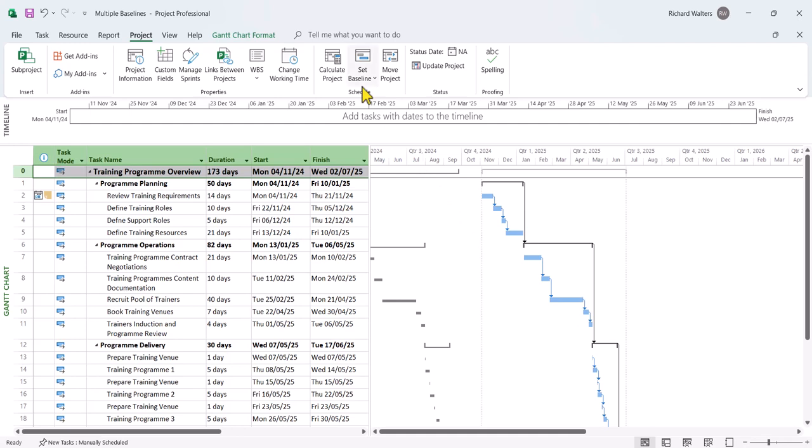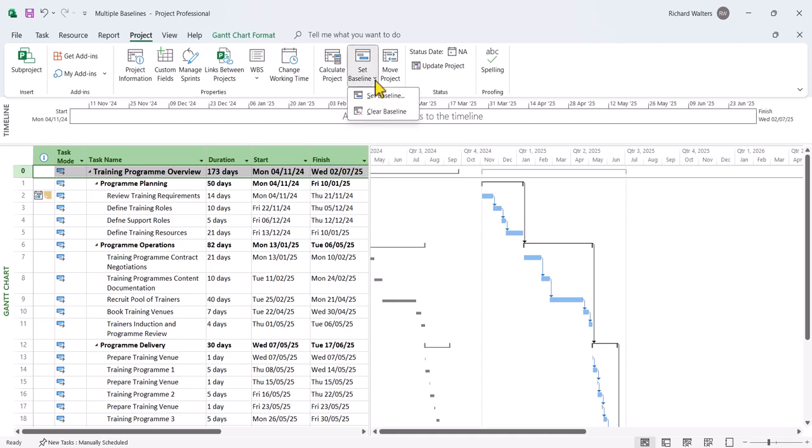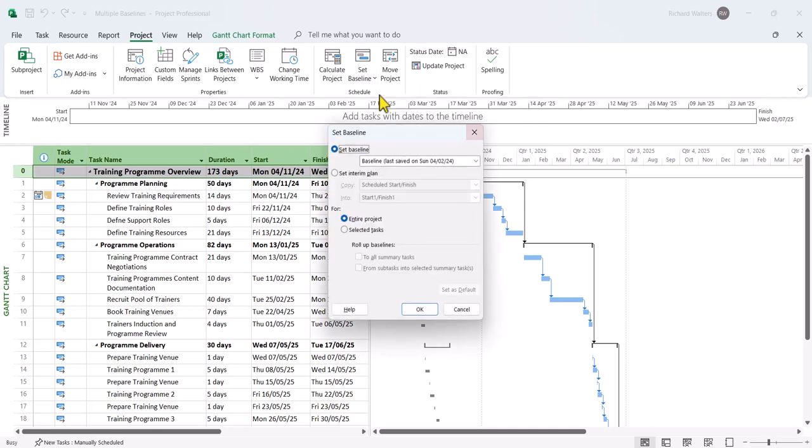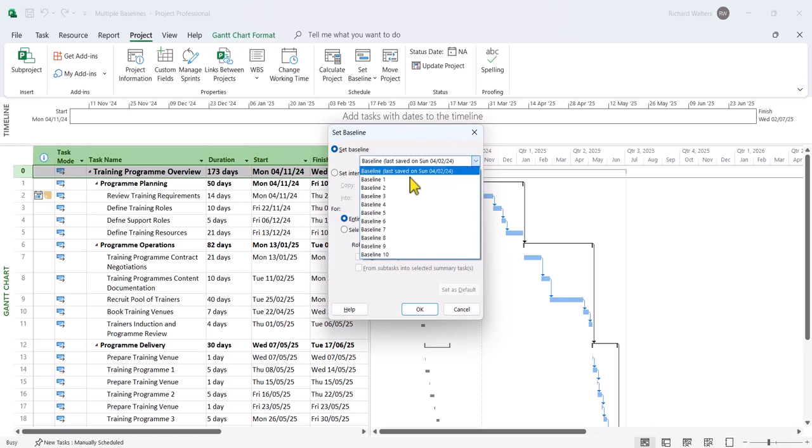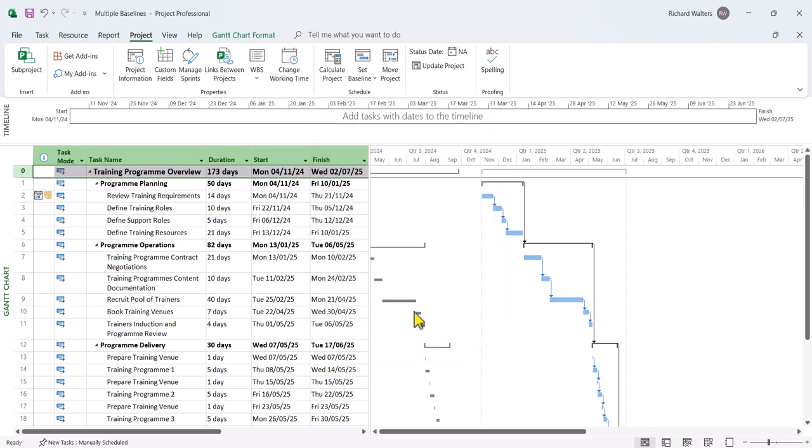So let's set baseline. And I don't want the baseline last saved. I want another baseline. So we're not going to overwrite the baseline we've already got. You should always keep baselines as information and to show you where things might have changed throughout the project or process. So I'm going to a brand new baseline, a second one called baseline one. So this is the way you work multiple baselines. So baseline one. And I'm going to set it now for the 4th of November. OK, so now the old baseline graphic right now is of no use to me because I'm being measured against the new baseline.